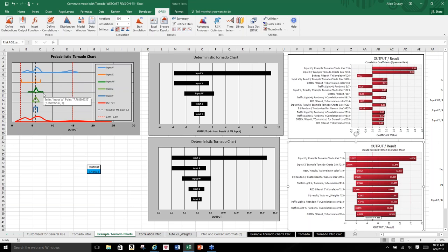Or maybe here's a two scenario where the bulk of the probabilities is in the middle. You may have some analysis or some data that tells you that you think that it's in that tight little range there, but maybe there's a 10%, 20% chance that data is misleading, erroneous, or a red herring. So 20% of the time, you just know what the bounds are, and you have that as a uniform distribution from here to here. It is a simple triangular distribution here. The light green, the blue is a uniform distribution, so it would just have a flat top across the thing.